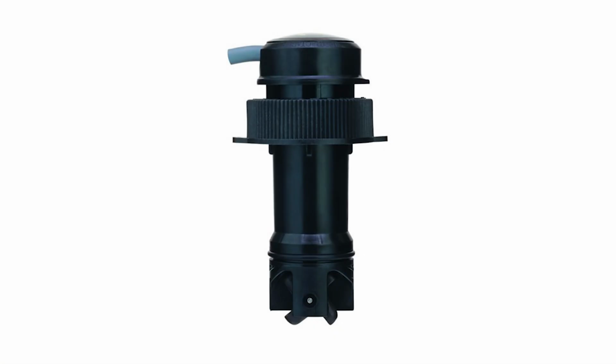They'll also fit the instruments if you need instruments put on the boat. When I'm talking about instruments, you can get them fitted at the factory, or some people like us chose a different brand of instruments that we wanted on the boat. So those would get fitted during commissioning. One of the big items to fit during commissioning is the speed and depth and temperature transducer that's actually in the bottom of the boat. So they have to drill a hole through the bottom of the boat to put that transducer in.